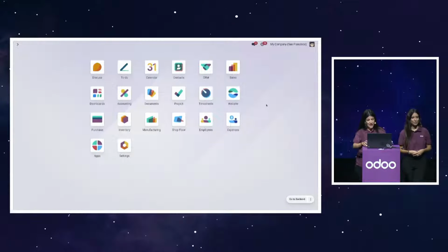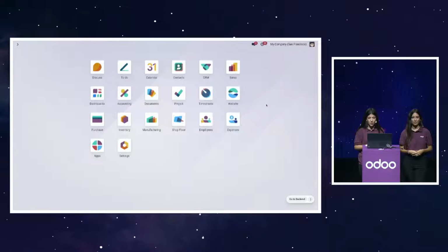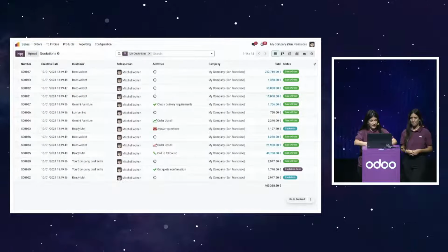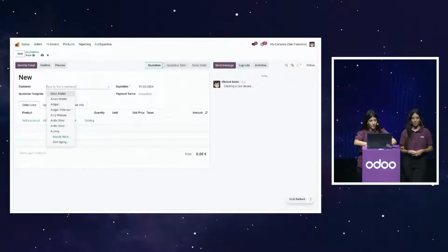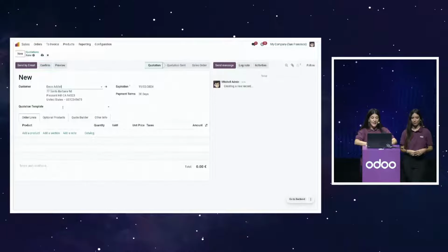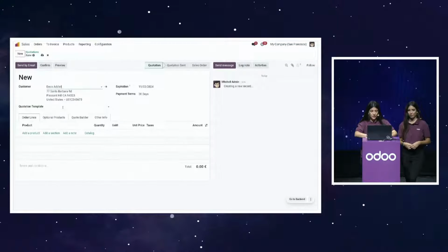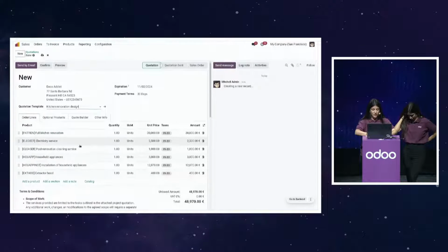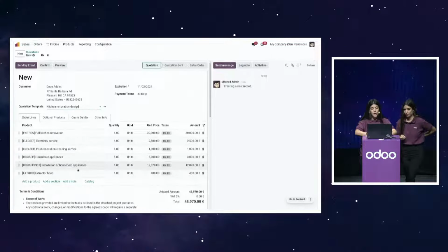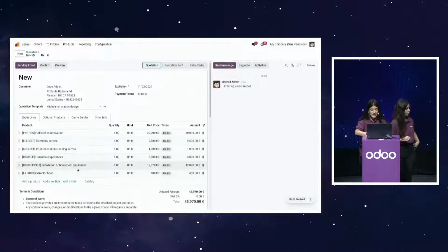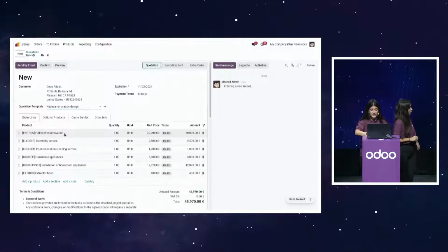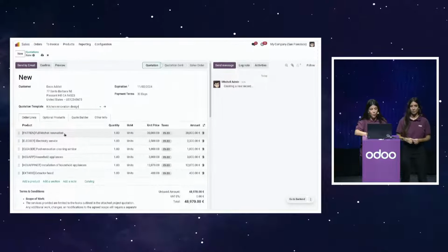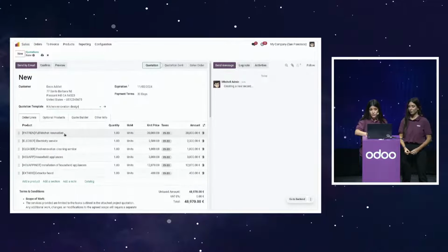Perfect, Barbara. So, as you have mentioned, we will start by creating our sales order. Let's open the Sales application and click New. First of all, we are going to add our customer, and this time we are going to use a quotation template that we already prepared. As you can see, in this quotation template, we already have some products and services. For example, we have the full kitchen renovation service that is already configured to create a project with its tasks once the sales order is confirmed.